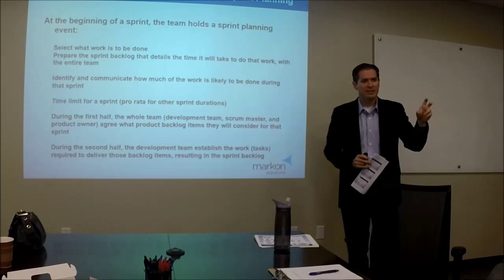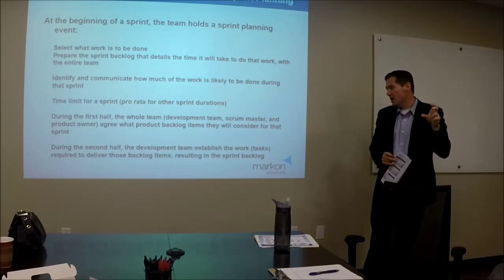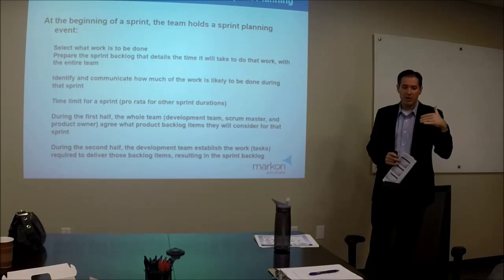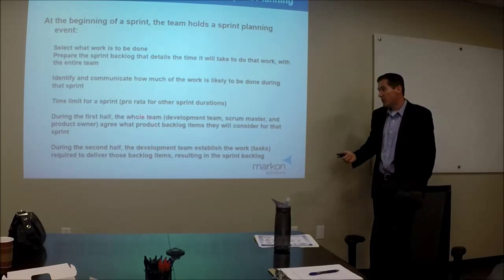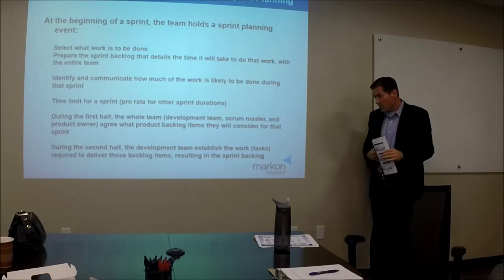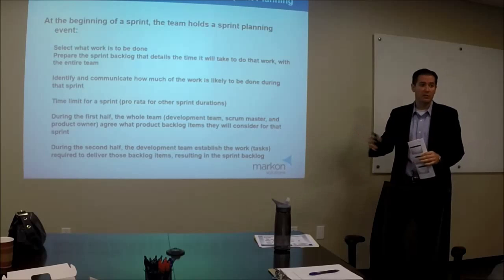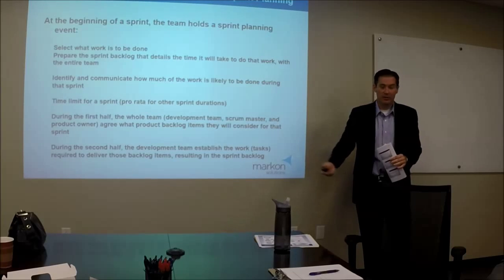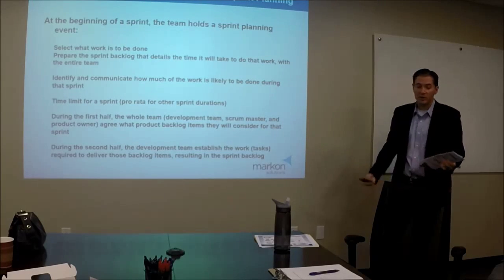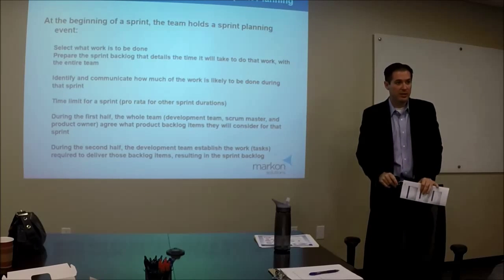In the next half of the sprint planning meeting, we say, okay, what do these things mean? What are we really going to get done? What's the shippable product for each of these things? How are we going to work those down? What are our goals? What are we going to do as a team? So that's pretty much how that meeting is shaped. The meeting is all about looking at the sprint duration, but I'm going to keep saying 4 weeks. Looking 4 weeks out, what are we going to deliver for our product owner? At the end of that sprint planning, you usually want the product owner to say something to the effect of, hey, if you guys get all that done, I'm going to be real happy. That's what I need.